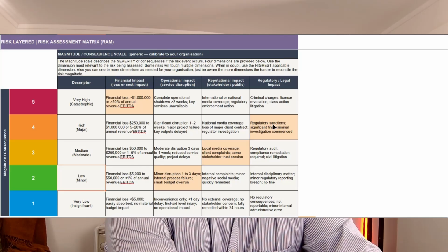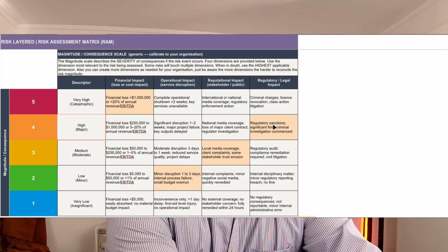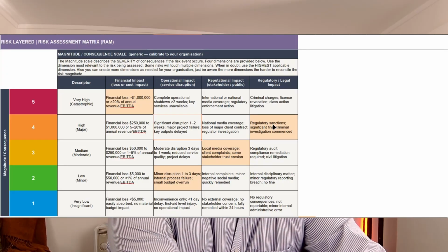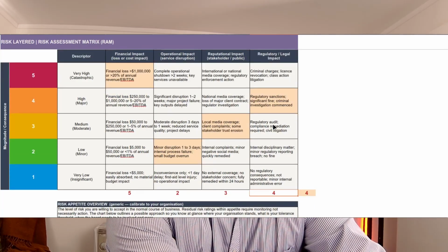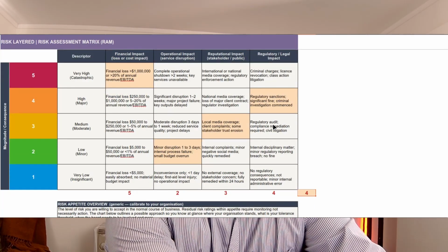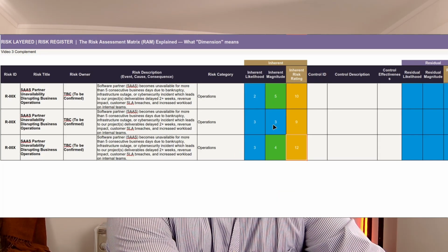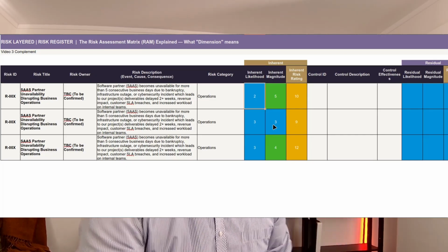So that is 5, 2, 3, and 4. We got them here at the bottom. And the average, rounded up, will be 4. And that's what it gives us, this 4. And it becomes 12. And right there, you can see the difference. Gut feeling, 10; 1 dimension, 9; several dimensions, 12. Same risk, very different scores.